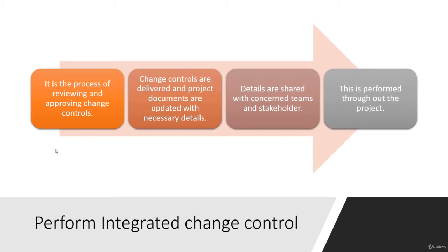A change request can in itself be a project, a mini project. It may have multiple requirements. It could be small, it could be a big change, so big that you can't even accommodate it in the current release, and you may have to plan for a new release. So don't assume that these changes are usually small. These changes could be big, and any stakeholder can propose a change. So if the question is who can propose a change request, remember that any stakeholder can ask you to make a change.